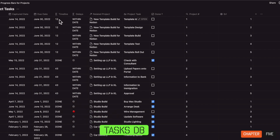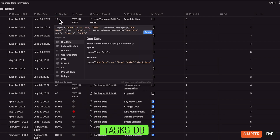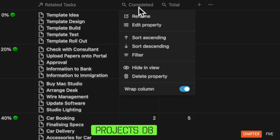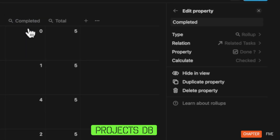I also have a formula in the task database that calculates the number of days remaining for me to accomplish the task. So if the done checkbox is ticked, it's marked off as done. If it's overdue, it's marked off as due. This is then rolled up to the original project database.